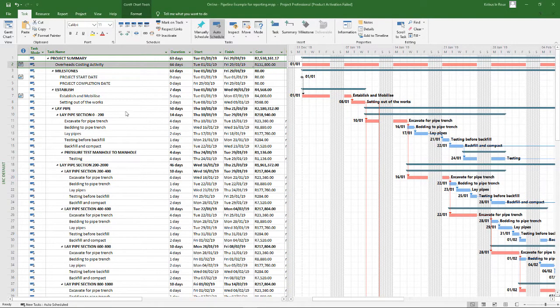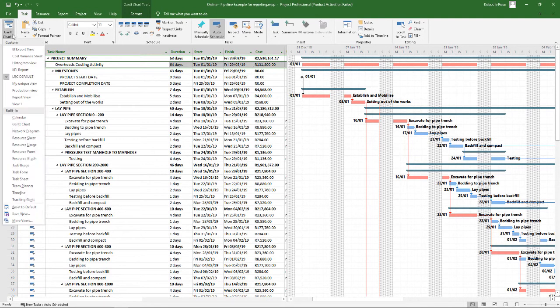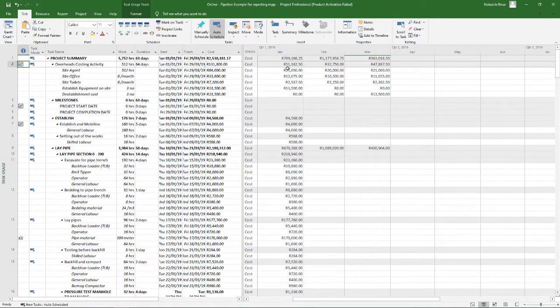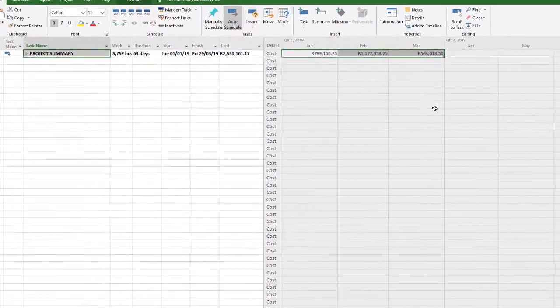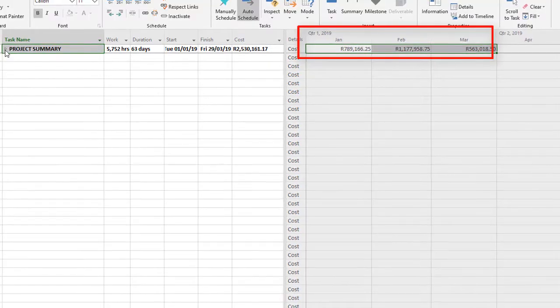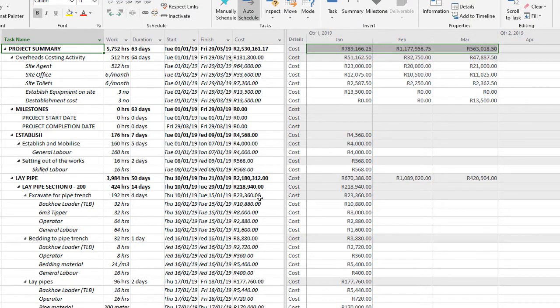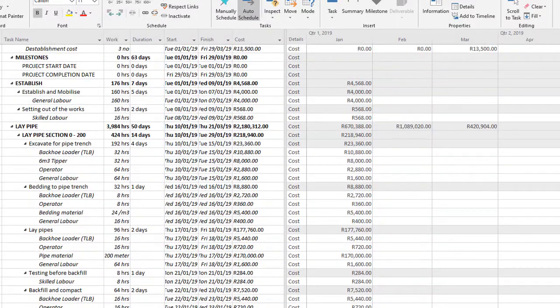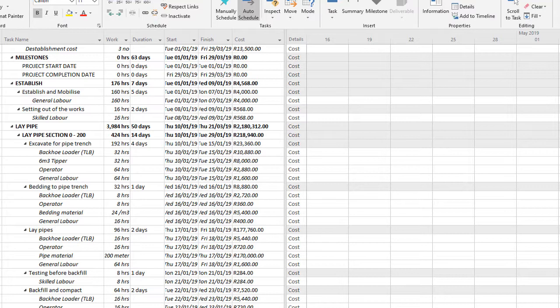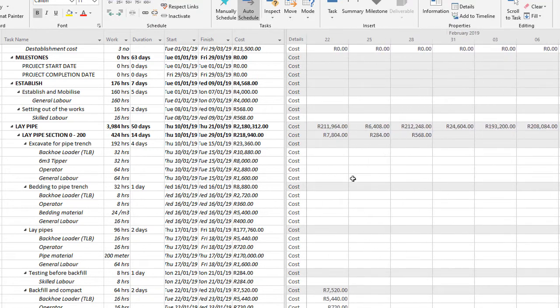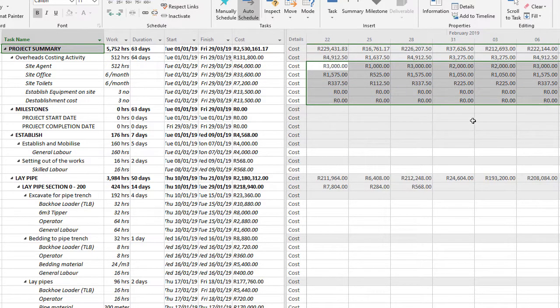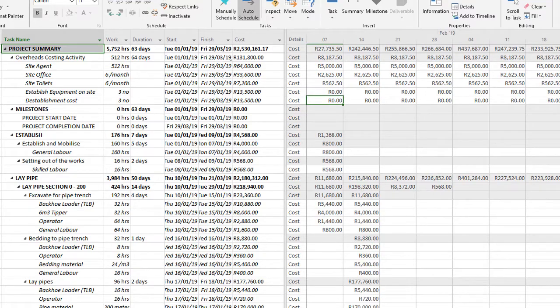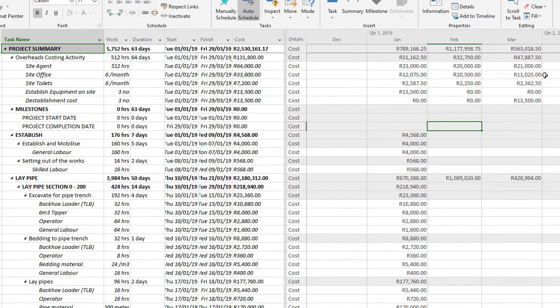Now the second advantage is that we've got access to a massive amount of information in setting up this estimate. If I go to my task usage, you'll see I've got my cashflow forecast for this project immediately and automatically calculated by the software. And if I open it up, you can delve into the nitty gritty details of each and every activity that's been allocated with your cost on that specific item. You can spread it over the months, or you can even go to a daily view and see what's going to happen on a specific week or day and what's the amount you're going to spend. The cashflow is divided down into minuscule detail that you probably will never need to go into. But there's my cashflow. And as I start updating the schedule in future, this will automatically be adjusted as well.